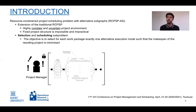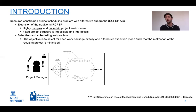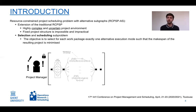The selection subproblem means finding the best set of alternatives in the project. The scheduling subproblem then schedules the selected activities based on precedence relations and resource constraints, similar to the RCPSP. The objective is to select exactly one alternative per work package such that the project makespan is minimized.